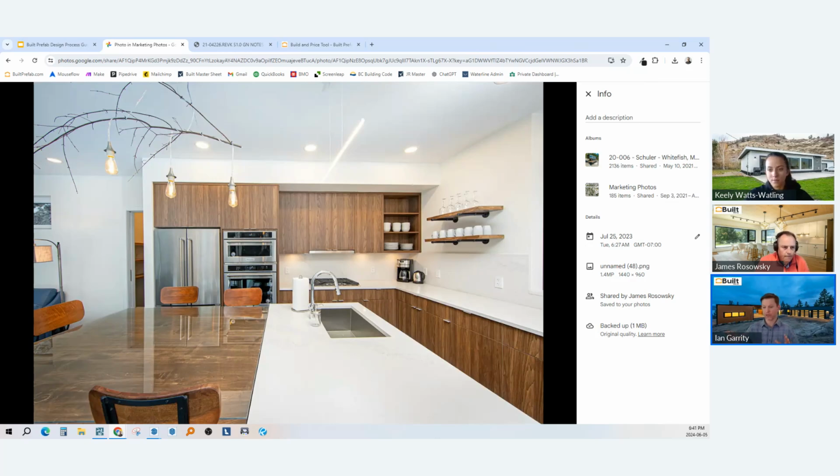And that's really not what modular is set up for. It's very front loaded for due diligence, design and preparation, because once you hit the go button to start building, it goes so much quicker than site building. You don't have the luxury of figuring it out in real time. It all has to be done beforehand, before we're ready to finish design or start production. Like I said, when we go through the process, we have a system, and we're not going to go to the next step until the first step is done. It gives us the right amount of time to consider each area. Hopefully that answered your question, Paul, but we'll figure it out.